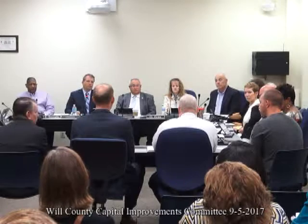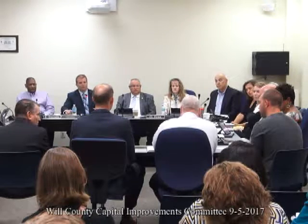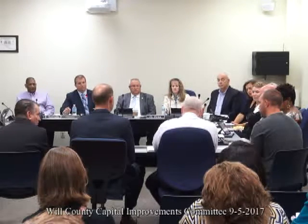Starting on design release 3 scopes. Those are the packages, or the drawings, as Jason alluded to, that we'll get on 9/22. And those are the drawings for design releases 3 and 4. So we've got to prepare to get those out on 10/10 for that group of packages, which will be primarily the MEP and a few of the other interior and exterior packages. And that'll be an ongoing effort for estimating, design review, comments to the design team, and scope writing.